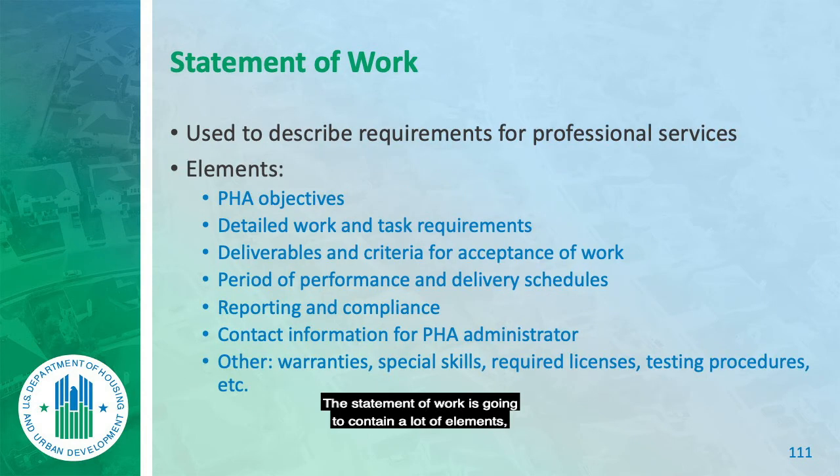The statement of work is going to contain a lot of elements, including what your objectives are, any detailed work assignments. You know, when I do lawn care, I tell people you're going to do stuff in a certain order so I get what I want. First, they pick up the trash. Next, they edge and trim. Next, they cut. Now, why would I do those in that order?